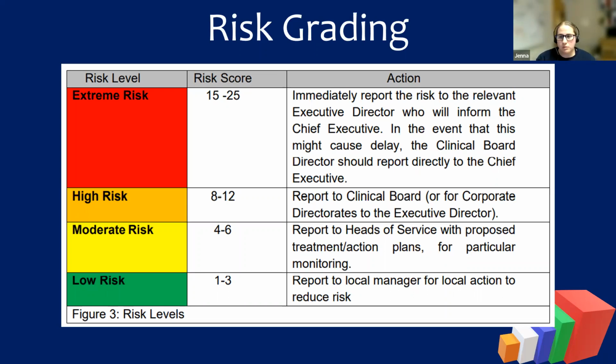And this occurs multiple times throughout the risk management process. So like I said, a score should be completed initially without any controls in place. So worst case scenario. Once you've put some form of treatment or control in place to help mitigate that risk, another risk score should be taken. And realistically, not always, but most of the time the consequence sometimes doesn't change, but actually with effective controls in place, it should decrease the likelihood of that risk occurring. So the overall score should be lower.